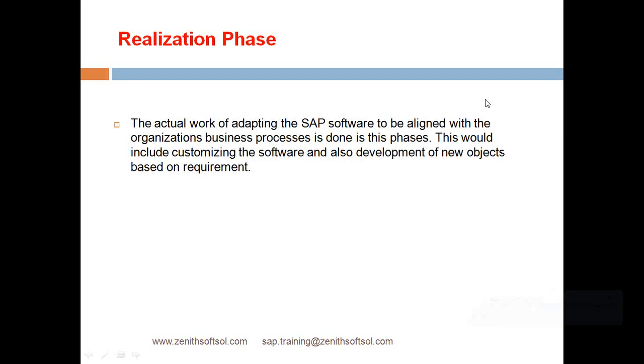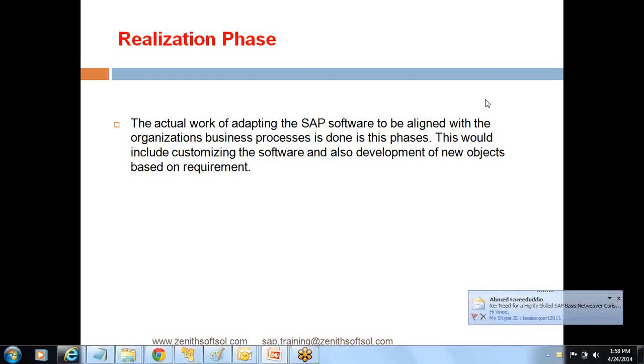And also the main focus you should be on the RICEF development, which will be done by the ABAPers, and data conversion readiness, system configuration, unit test, and other end-to-end testing of the SAP system with final acceptance by the business. So the ultimate goal of this phase is to build, configure and test the SAP system and release it for go live. So when I talk about review of RICEF, then what the ABAPer will do in this,